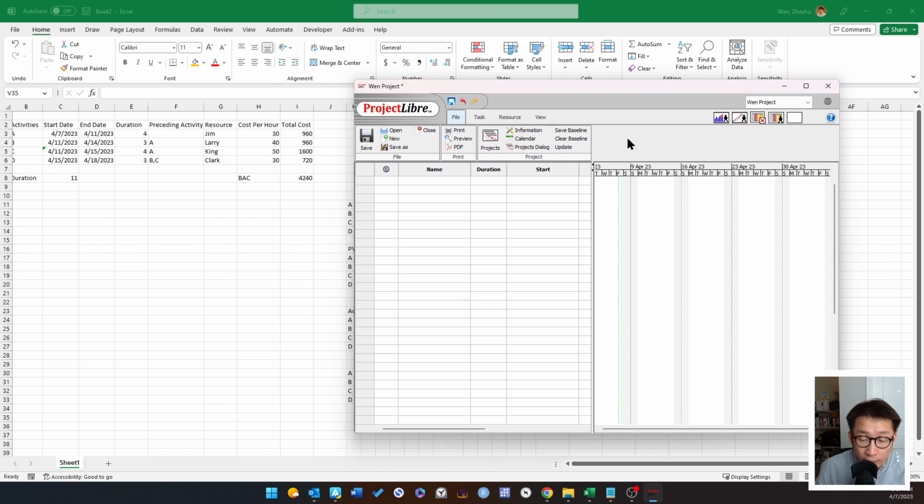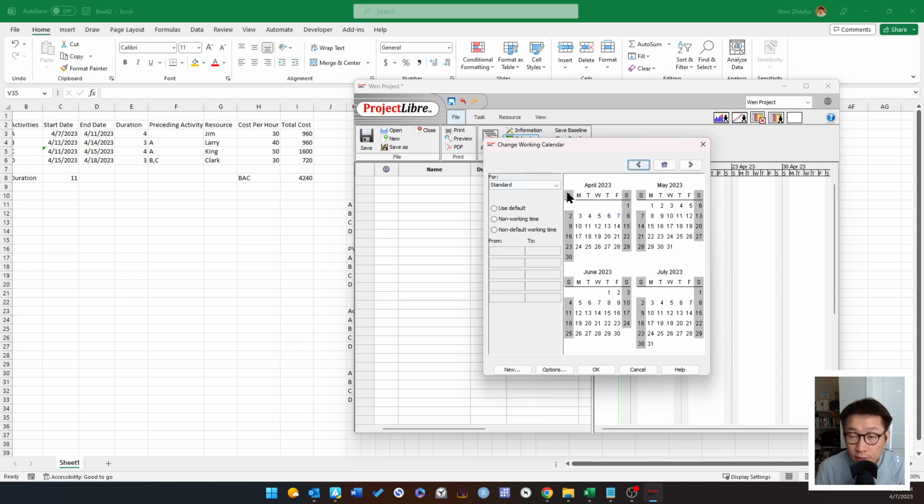Before I do anything, I'd like to change the work schedule so that it doesn't consider the weekend, because all the classroom examples I have used so far didn't consider the weekend. It's not a big deal, but it takes additional effort to figure out why a duration looks like 6 days even though we're planning to do it in 4 days. You click the weekday label here, then select non-default working time. That will help you eliminate the weekend.